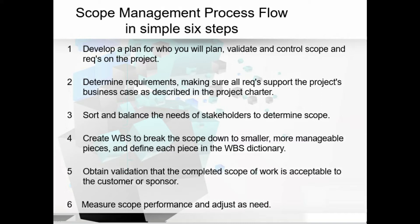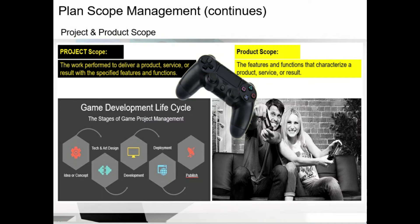This is about the scope management process flow. Now let's discuss product scope versus project scope. Product scope means the end results — for example, a new airport terminal that meets all technical specifications compared to product requirements. Project scope means delivering the product scope; it includes planning, coordination, and management activities that ensure the product scope is achieved.